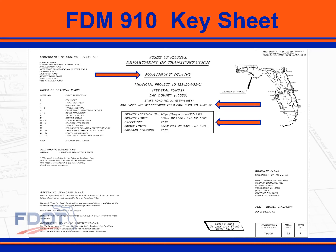Third, replace the key sheet map with the project location URL. The URL accesses GIS mapped locations developed to support the work program. Section 910.2.2 provides instruction on creating the URL. Work limits is information that would have been called out on the county map with leader lines.